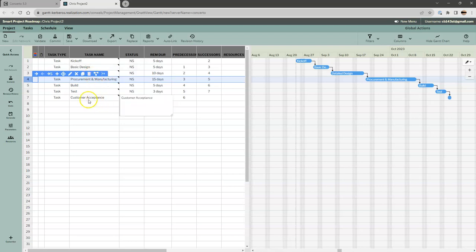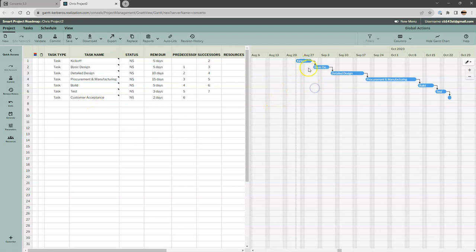Okay, so here I have a pretty linear network, right? In general, we would like to design even the most complex network as linear as possible. If you can just keep that in the back of your head as you're thinking about the phase structure, certainly it is linear, right? Within any project, we do phase 1 before 2, before 3, before 4. It should be linear, let me put it that way.